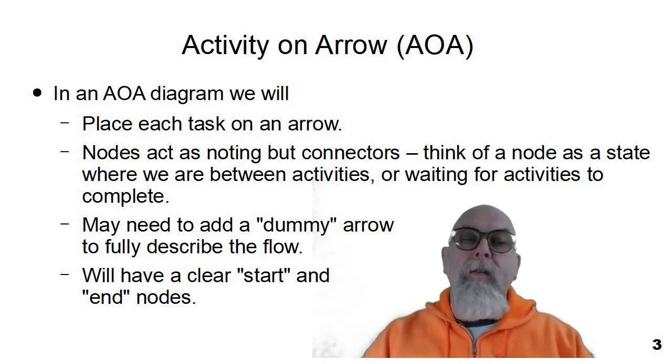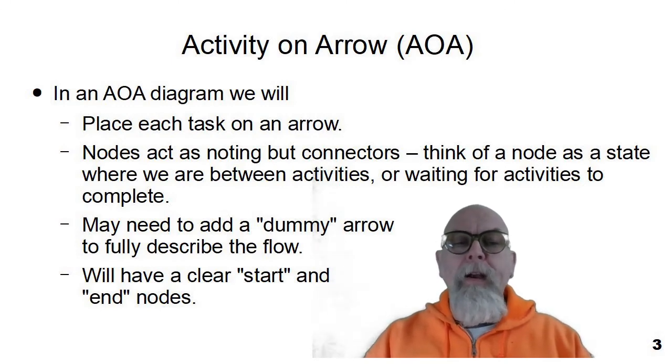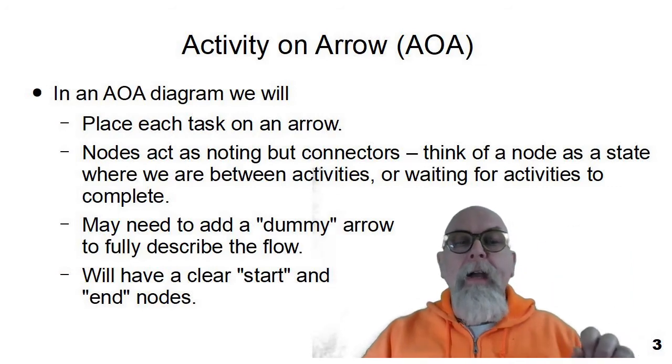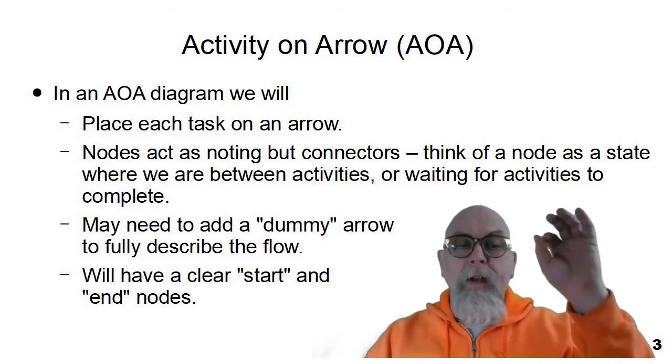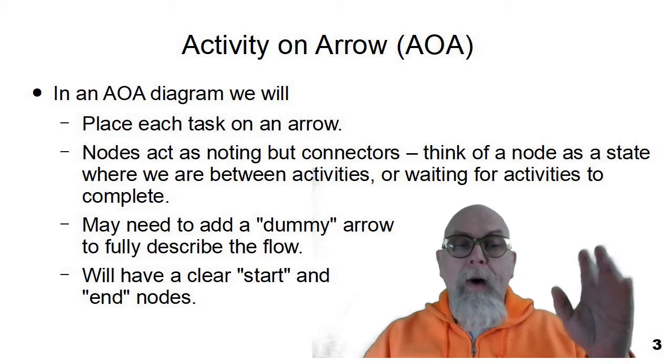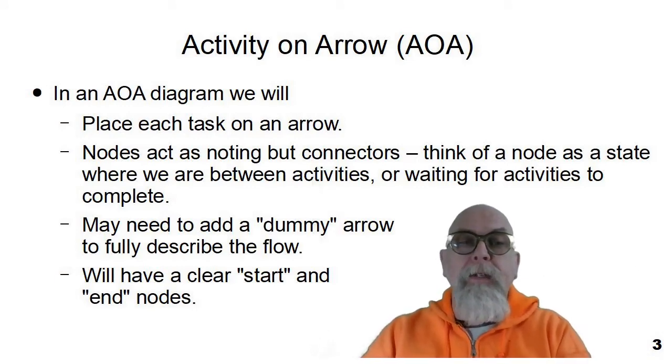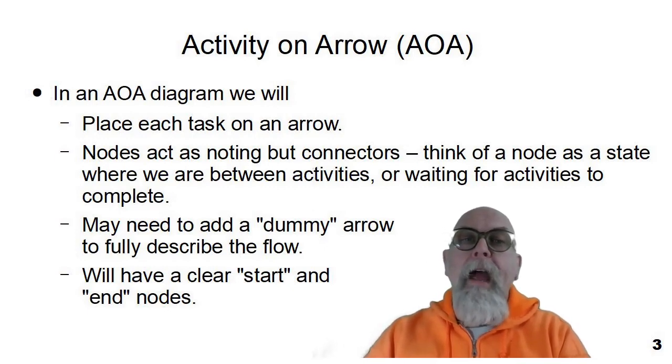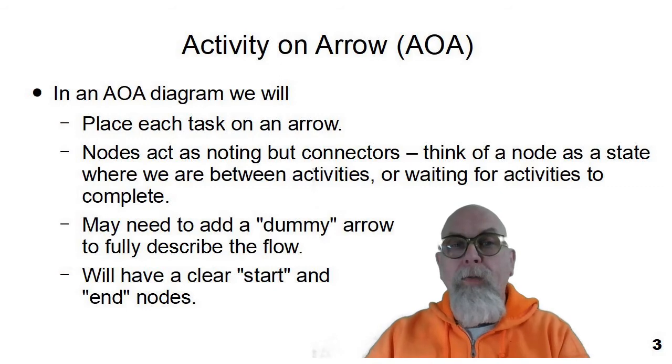Activity on arrow diagrams, network diagrams, are different than activity on node diagrams in the way that the activity is actually designated in the diagram. In an AOA diagram, activity on arrow diagram, the activity happens on the arrow, and the nodes are just places to wait until all of the arrows arrive.